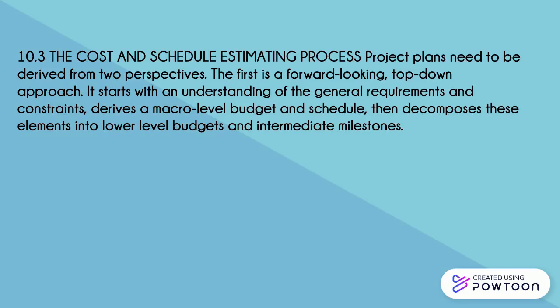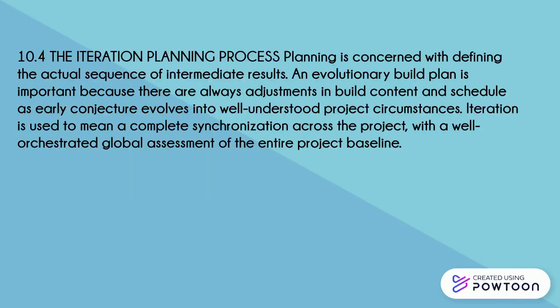The cost and schedule estimating process. Project plans need to be derived from two perspectives. The first is a forward-looking, top-down approach. It starts with an understanding of the general requirements and constraints, derives a macro-level budget and schedule, then decomposes these elements into lower-level budgets.